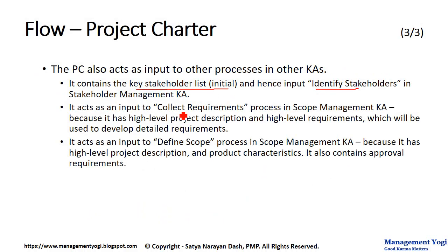It is acting as an input to the collect requirements process in the scope management knowledge area because it has a high level project description and high level requirements, which will be used to develop detailed requirements. After all, in collect requirements, we create the detailed requirements documentation.